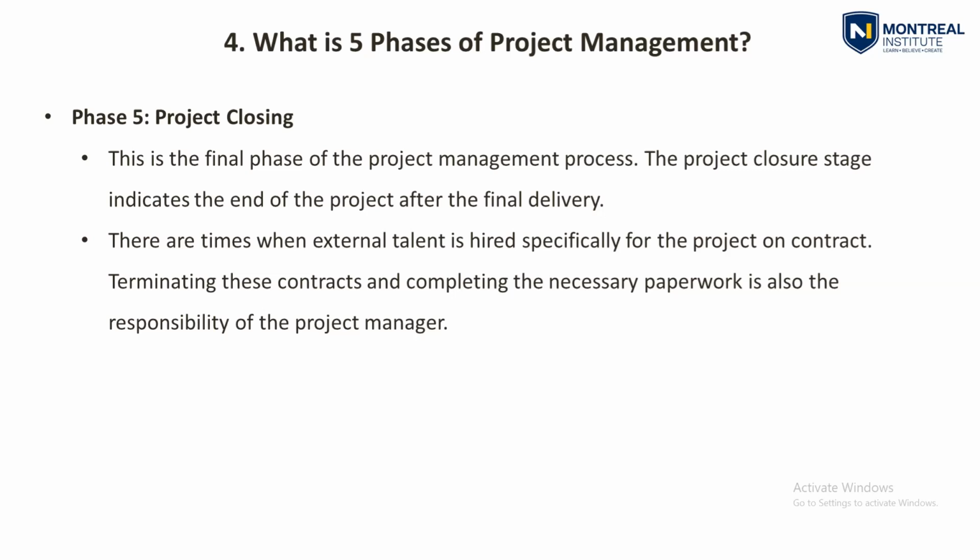So what happened in my project now is we have back charged our subcontractor for their delay, and they have also submitted an extension of time and claimed for the prolongation cost.